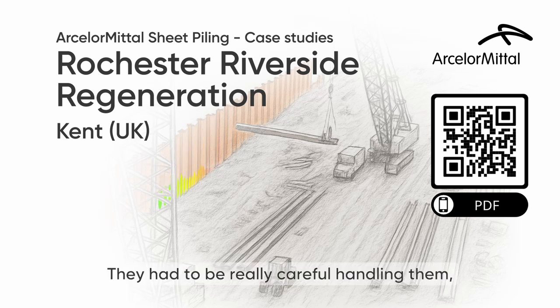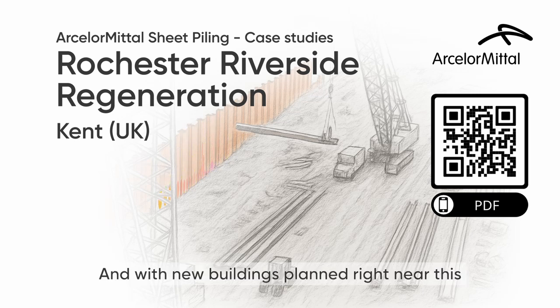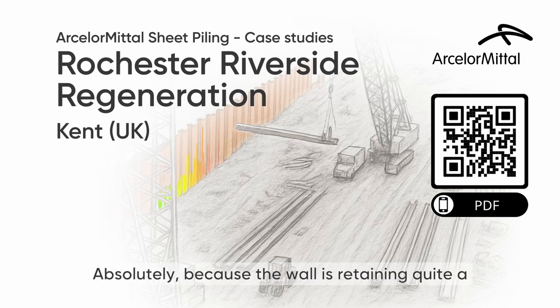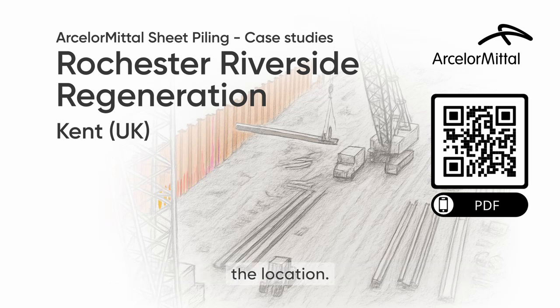They had to be really careful handling them too, using special vessels and lifting gear with a big Kobelco crane, specifically to avoid damaging that protective coating. Right, you don't want to scratch the raincoat. Precisely. And with new buildings planned right near this wall, they needed robust support systems behind it too, I guess. Absolutely. Because the wall is retaining quite a height difference in places and supporting the land for the new buildings. They used a variety of techniques depending on the location.